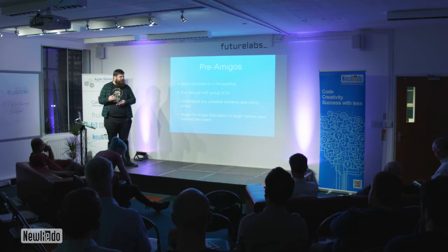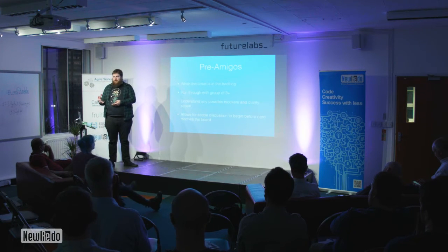So if something's a particularly complex piece of work, a developer or the development team might need a while to think about it. So having a session with 3 or ideally more of your team where something's in the backlog and not necessarily about to come in, but you're just getting a bit of a, what is this ticket? How are we going to approach it as a team? It's really useful, and it gets them thinking about how they're going to do it when it comes to time. And obviously allows us to go away and remove the blockers before they become blockers.